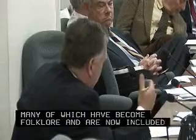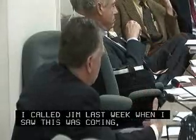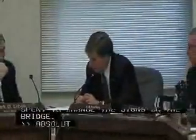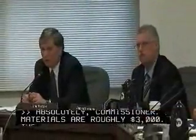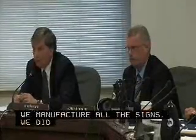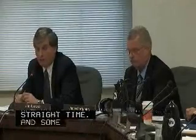And I had asked Jim, I called him last week when I saw that this was coming. Jim, I was wondering if you could give us the amount that TBTA spent to change the signs on the Triborough Bridge. Absolutely, Commissioner. Materials are roughly $3,000. The labor, $25,000. For a total cost of a little under $30,000. We manufacture overlaid types of signs. We did not replace signs in full, and we used in-house force on straight time and some overtime.